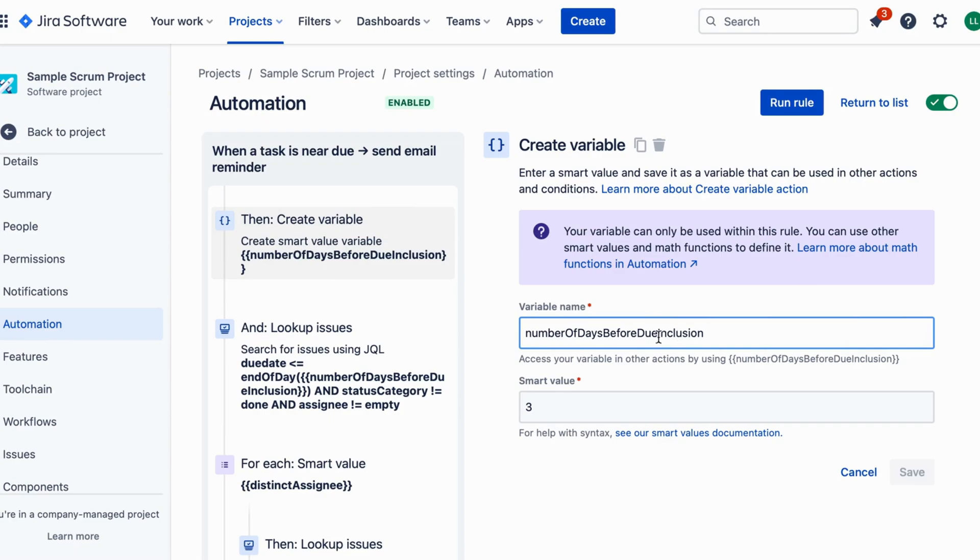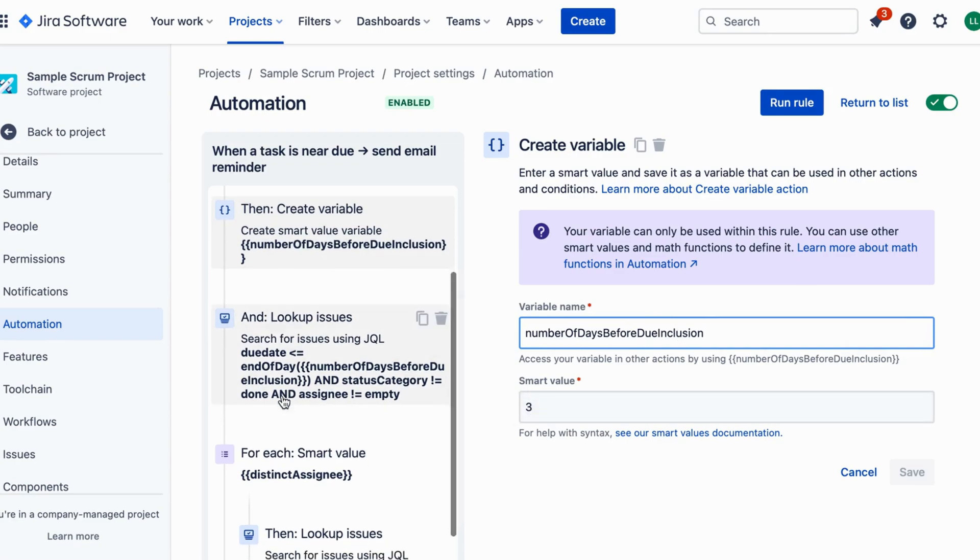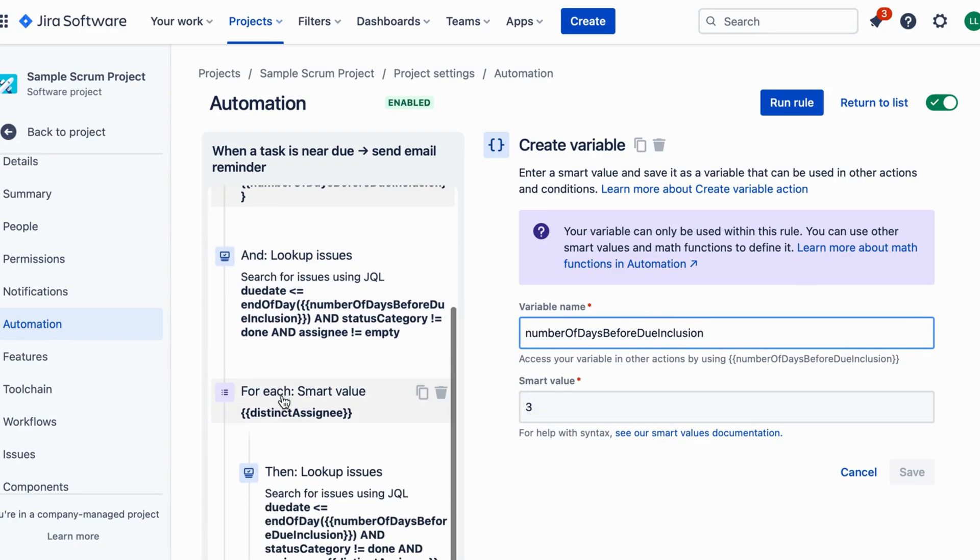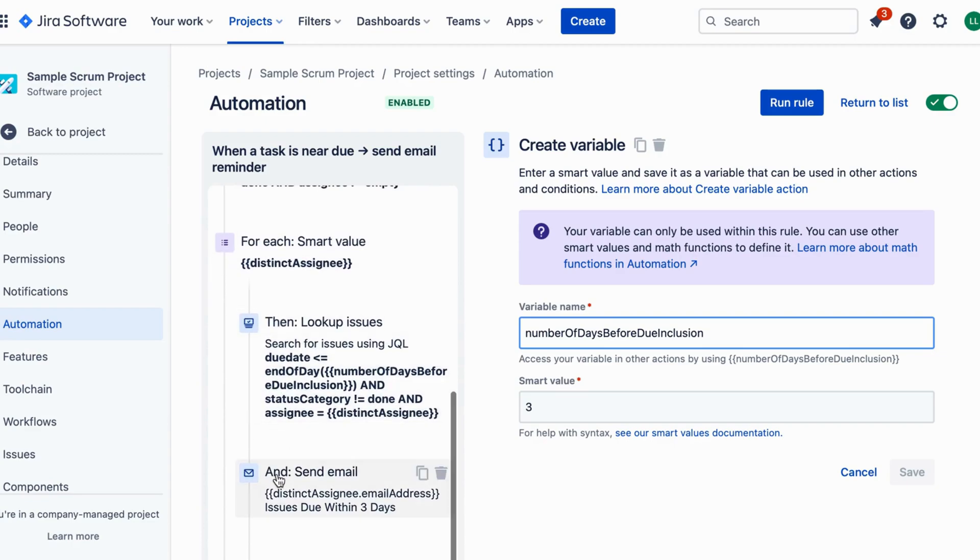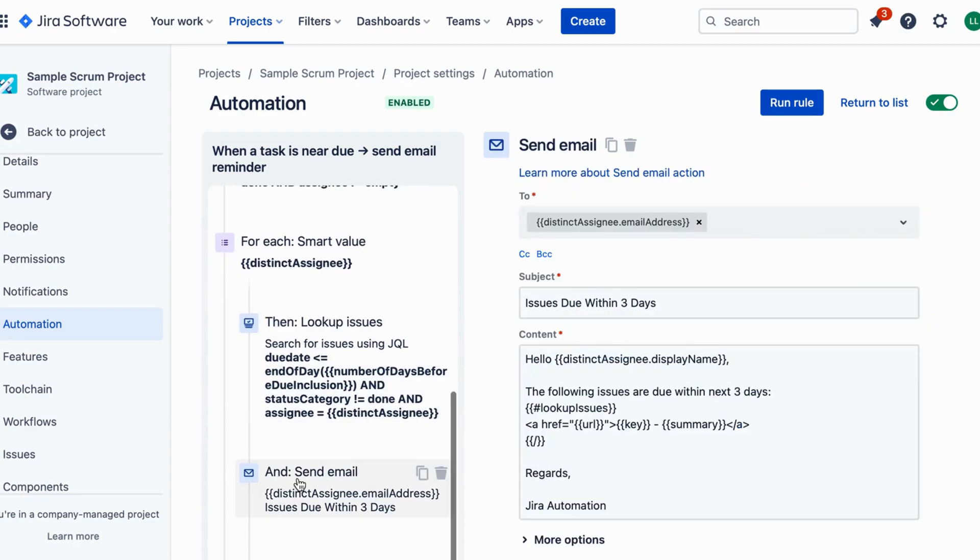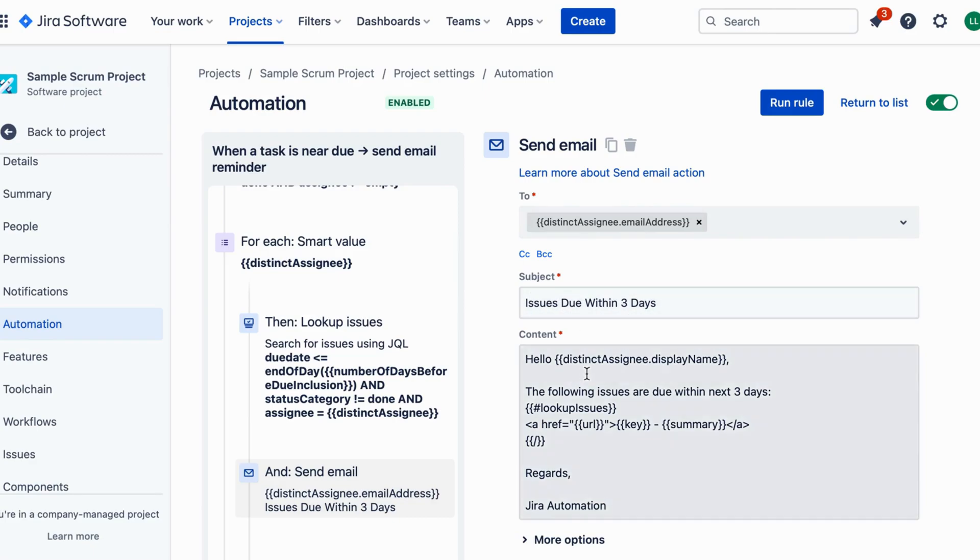Time for the magic. Click on add action and select send email from the options. Now we configure the email details. Fill in the recipient's email address, subject, and message for the reminder email. You can use placeholders like issue key, issue summary, and issue date to personalize the email with issue-specific information.